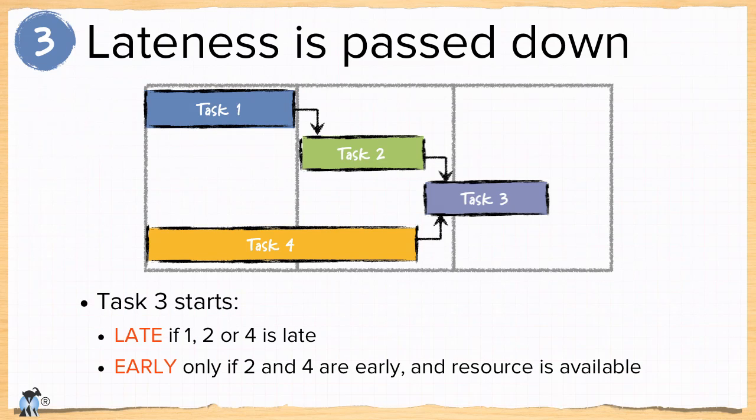Compare that to what it takes for task 3 to start early. Task 3 can start early only if the combination of tasks 1 and 2 is early and task 4 is early and the person who will work on task 3 is available.